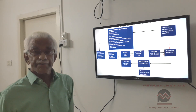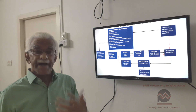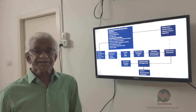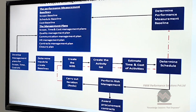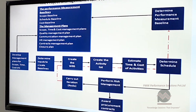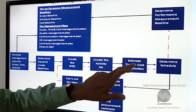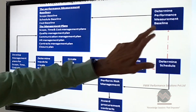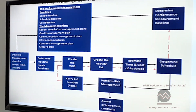The risk management process impacts the schedule, and the final output is the performance measurement baseline — for the schedule as well as for the cost. The three together — scope, time, and cost baselines — are called the performance measurement baseline.